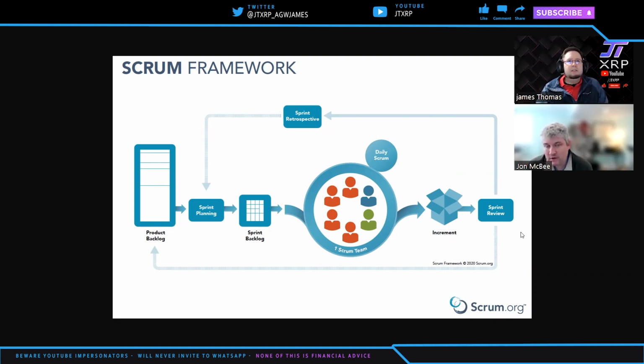Or no, so at the end of each sprint, we do that sprint review. Oh, okay, cool. We have a retrospective. But what I'm saying, the gap is a funding gap. At the end of the 3 sprints, our funding that we had allocated from the foundation is up, right? It's empty. So I have to go back to the foundation and say, this is overall what we accomplished in those 3 sprints. And this is what we would like to do with 3 more sprints if we want to do 3 more sprints. And so I have to start the big picture over every 3 sprints or so.